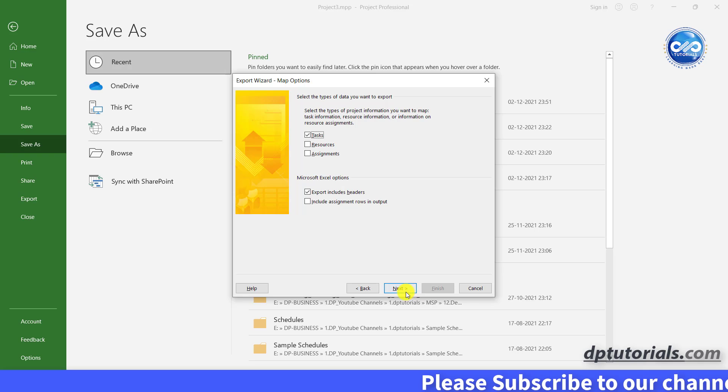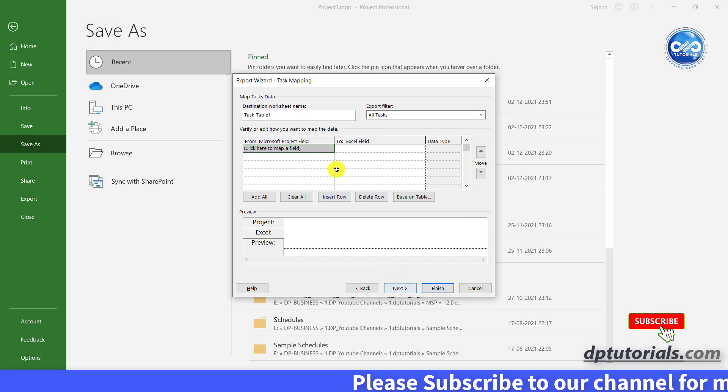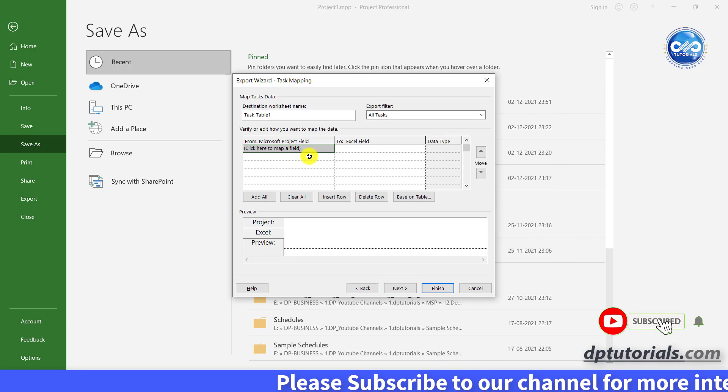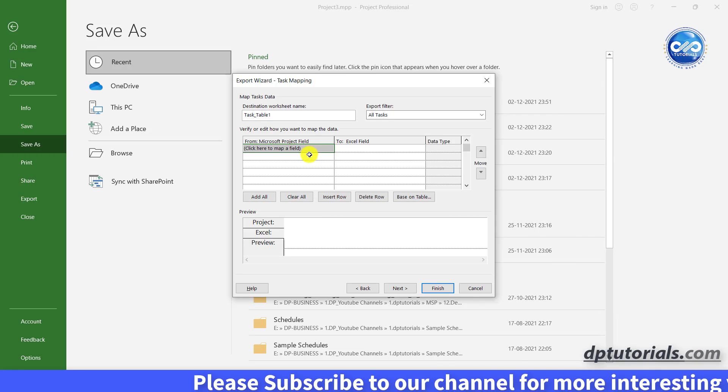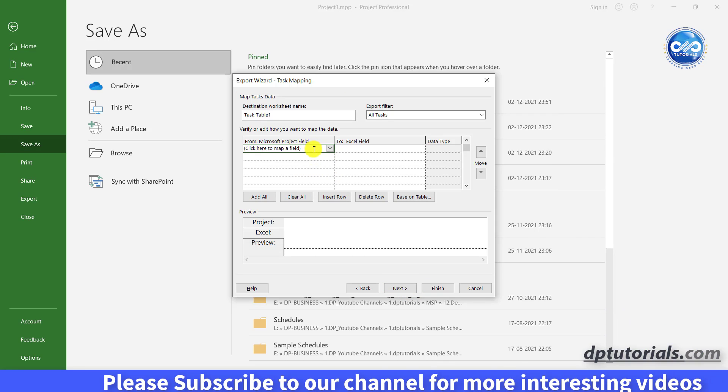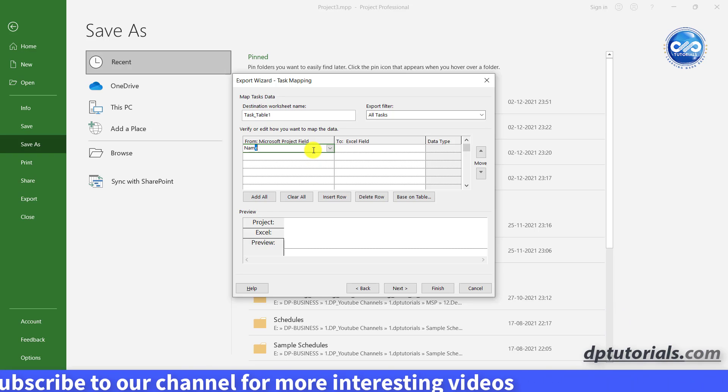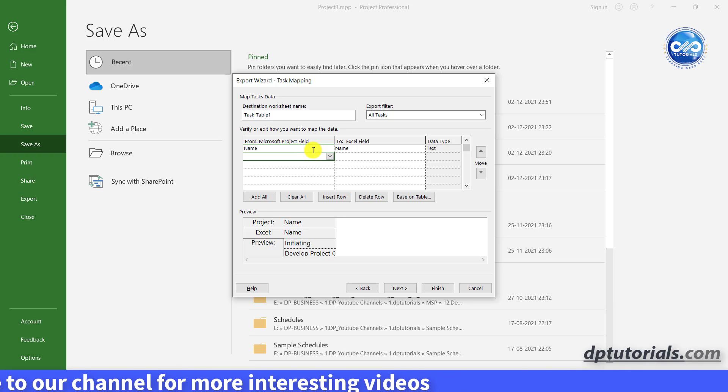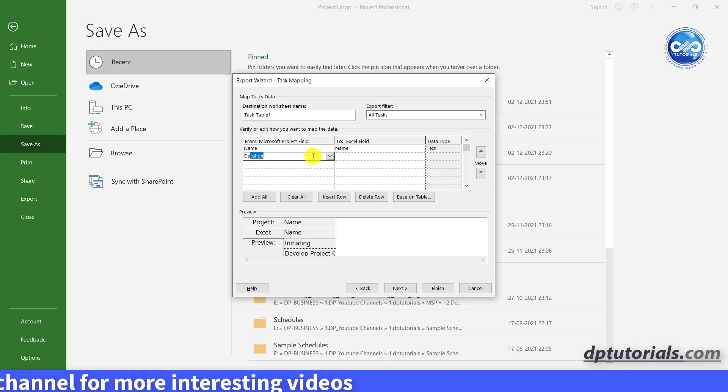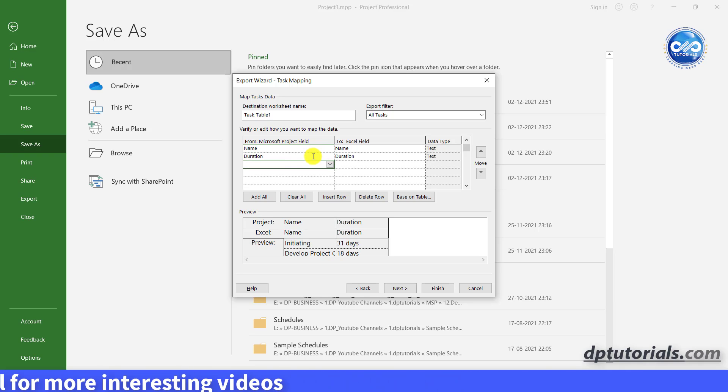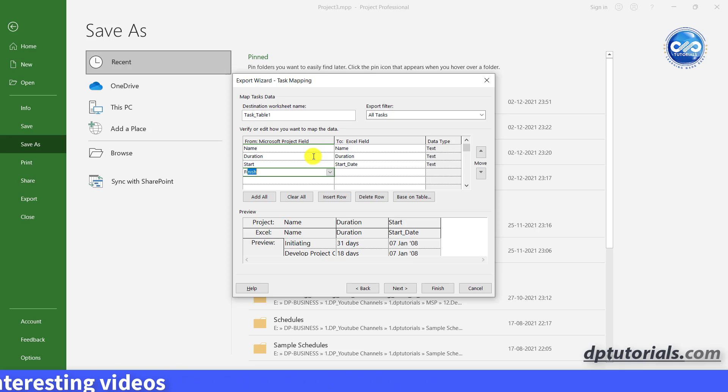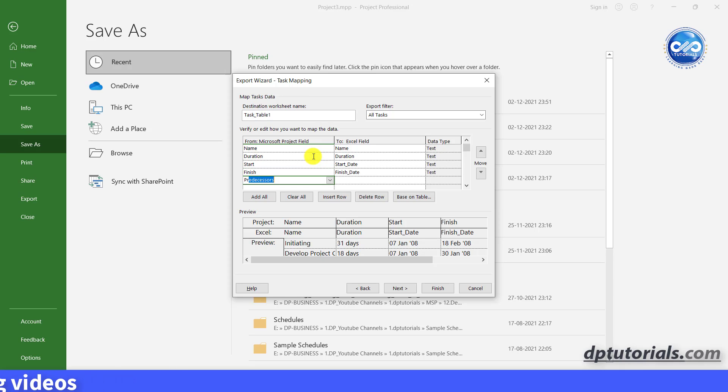Okay, click next and now here map the fields from project to excel, type name in the first cell, then duration, start date, finish date and then predecessor and click next.